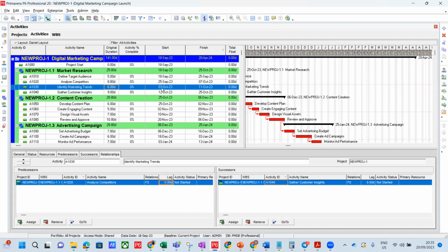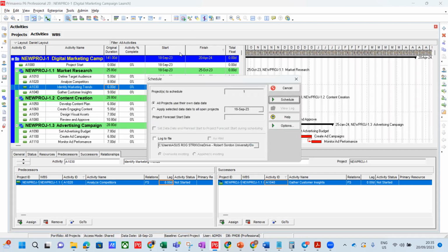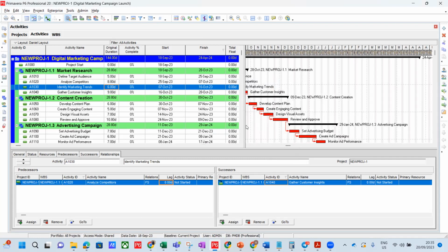Okay. So if you take the lag off, some people will just say they don't want lag because you can't see it on the table unless you start digging deep. You can run a report, or if you have DCMA or Primavera Risk Analysis, you can run a health check report. But looking at P6 directly, there's no column for lag. So that's why some people frown at using lag. Does that make sense? Yes, it makes sense.